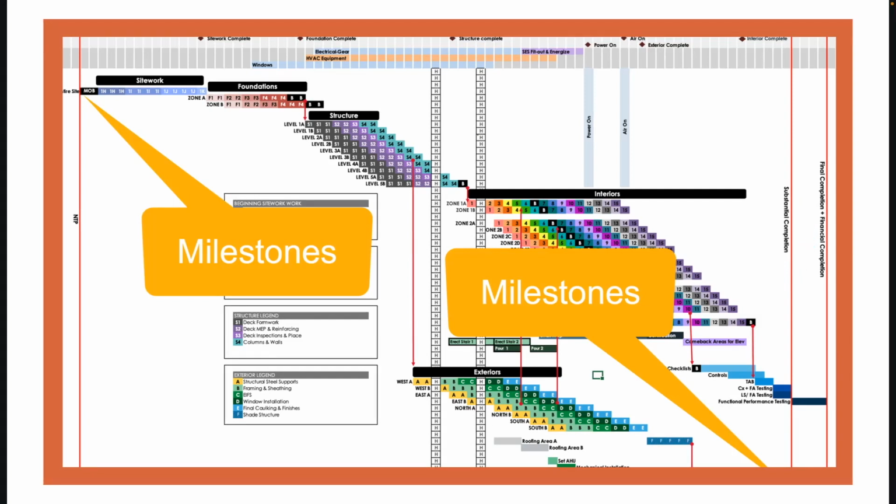So this is the concept of starting with milestones. As you develop the Takt plan, you can also identify intermediate milestones, like for instance, site work, foundation, structure, power on, air on, exterior, interior, things like that, and really drive the project. Give the team strenuous performance goals and have milestones that you can pull plan to.